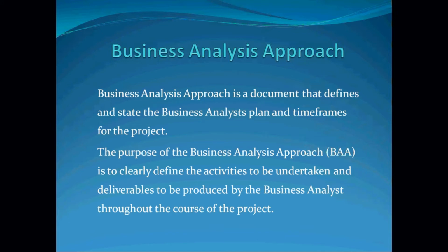So this BAA comes in before you even start documenting your BRD or facilitating a workshop, before you lay your hands on any job or produce any artifacts. You need to document this. This is the first document that you need to produce if the organization is actually using the BAA, and basically it's just a simple document.